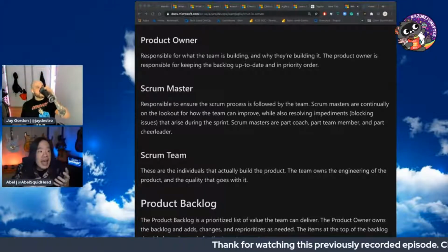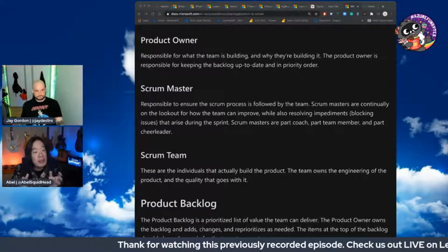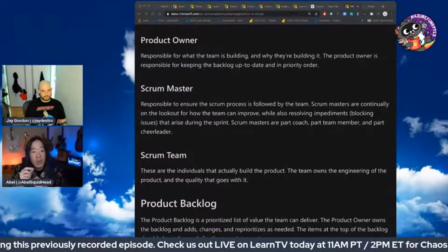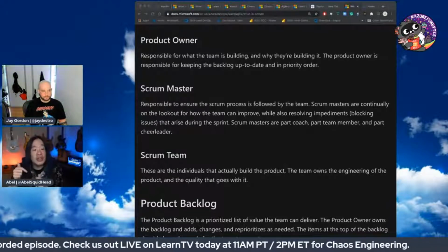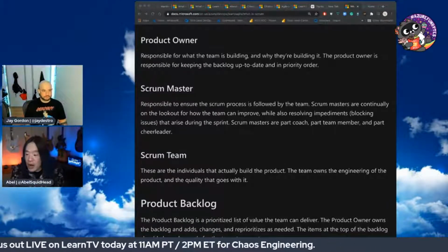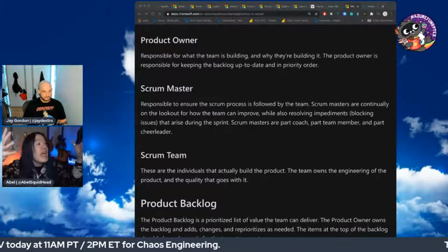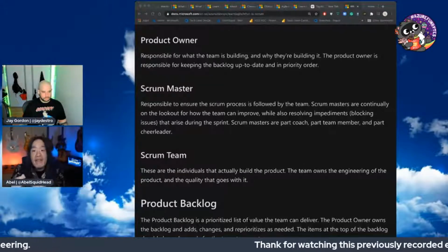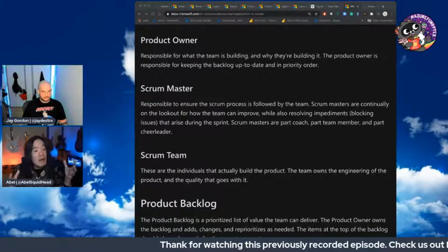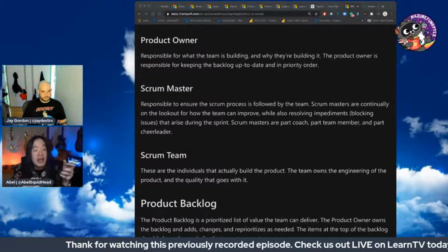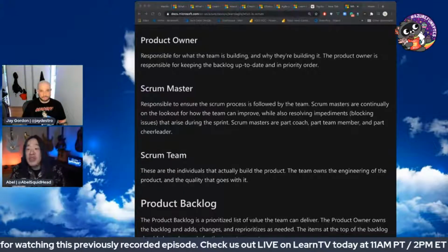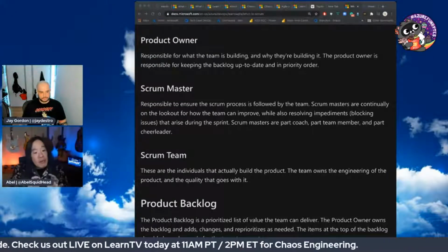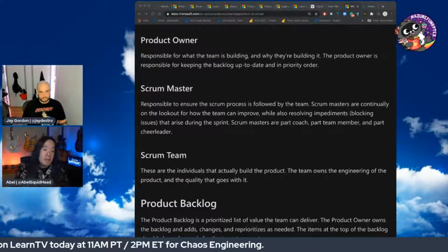We originally had some hospital admins act as our product owner, but we very quickly found out they didn't really know what the doctors wanted, because the people using our software were doctors. So finally, we realized the right product owner is a doctor who would be using our software. So we finally found a doctor who was going to be the product owner. And all of a sudden, we started building software that they wanted versus software that an admin thought they wanted, but doctors really didn't care about the features they were picking, right? So picking the right product owner is incredibly important.